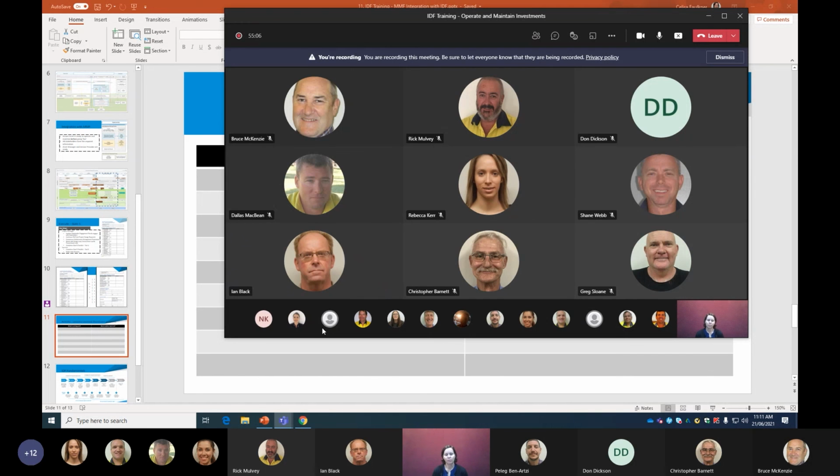In the training, we've made very clear to all the end users that it's not good enough just to write the people down on a list. You actually have to go talk to them and understand how they want to be engaged, and at what phases, because for different people that changes as a project matures and goes along the IDF phases and gates.